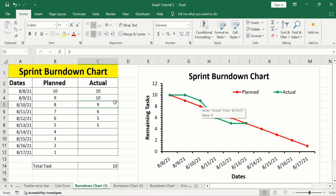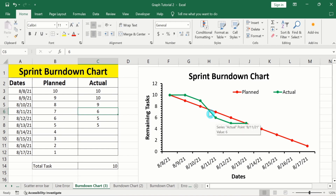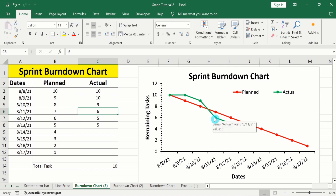Here you can see that we have sped up the work and completed three tasks, so the remaining tasks are 6. According to our planning, the remaining tasks should be 7. It is good for us because we are ahead of the plan. So if your actual work line is below the planned work line or ideal trend line, it indicates that you are ahead of time and working with good speed.